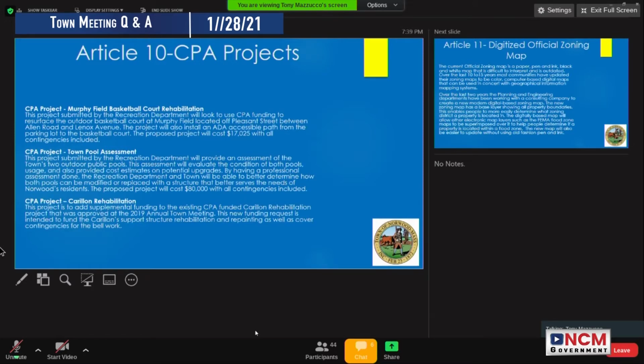So projects like this that are historic restoration but are complicated historic restoration, oftentimes you either need an enormous contingency in the project or you're coming back several times as you go through a project. I would suspect work on the Morse House would be something like that too. If it ever came up with, well, it needs new work and it's historic and it's $200,000, you can expect to spend much more than that, and you're going to look at it in a couple of phases just because historic rehabilitation is much, much more complicated. I'll hold here. Sarah Quinn, I'll go to you.